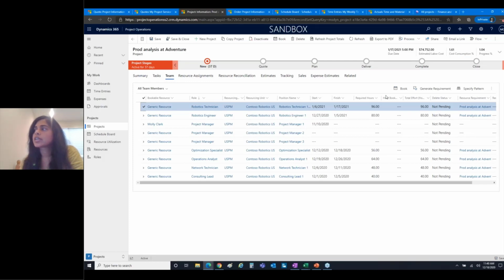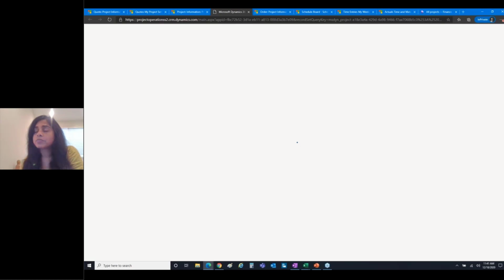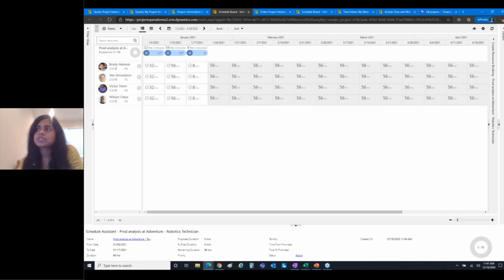The project manager can directly book somebody on their project, and when they're doing that, they are doing that with full visibility on the type of people they have, when they are available, when they are needed, what their skill sets are, and how that impacts the schedule of the project. If I don't find somebody available within the timeline, what do I do? How do I change this? And what is the granularity?